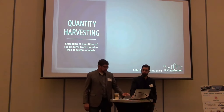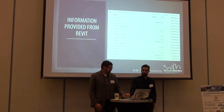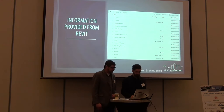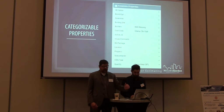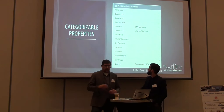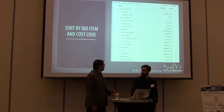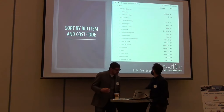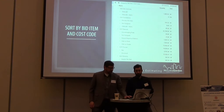Quantity harvesting is the extraction of quantities and scope items from the model, along with system analysis. This shows items that are included and how they're labeled when they come over into Symbl. We re-categorize them — for example, a cost code for a 3-hour wall — so we can identify it when applying prices. Once sorted by bid item and cost code, everything shows up as foundations, bid walls, slab items, stairs, and flatwork — organized exactly how we price within our system.